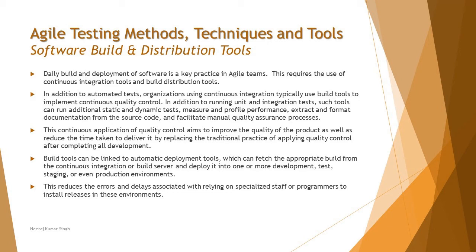You don't have to wait for all units to be developed before starting integration, which was the traditional approach. In Agile, we do it simultaneously and follow principles like 'fix bug first' — meaning before moving to the next iteration you clear all bugs from the previous one. Build tools can be linked to automatic deployment tools which fetch the appropriate build from the continuous integration or build server and deploy it into one or more development, test, staging, or even production environments.